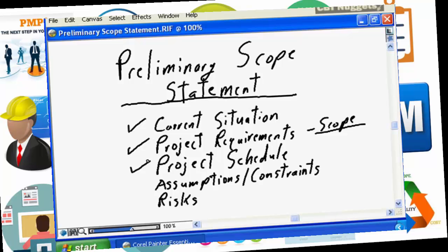Based on experience in my organization, a project of this magnitude would take 3 months in analysis, 6 months in design, 10 months in development. Based on my experience, or based on industry experience, or based on estimating parameters I have gotten from the internet, or from trade periodicals, or from that's your project manager's toolbox, you're going to develop the preliminary project schedule that says phase 1, 6 months.